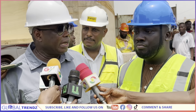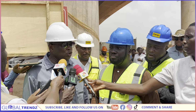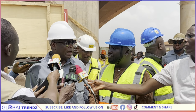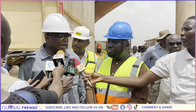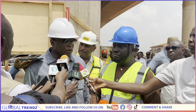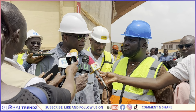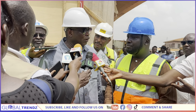We were fortunate to have the Nanano and everybody there who agreed to cease using the bridge, with a recommended recall for the next 2-3 months, so that the contractor can have full access to do that. And we are taking the opportunity to thank Nanano for this kind gesture. The contractor has promised to work within the schedule. What we are going to do is to take off the slab and then do the corrective measures with the beams, and then the engineers will recommend how to put it back so that it is fit for purpose.